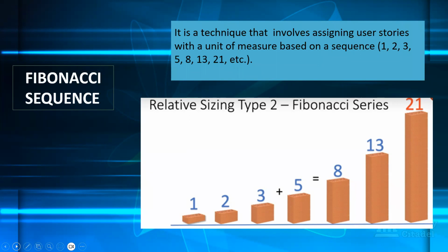And then they did an estimate on that story, and almost all of them are coming to a 13. Okay, so a 13 is too big a story to go. So maybe the BA has put two things together to be done on that story. Let me give an example. This wouldn't be it, but just an example: a login and forgotten password. They put it on one story.